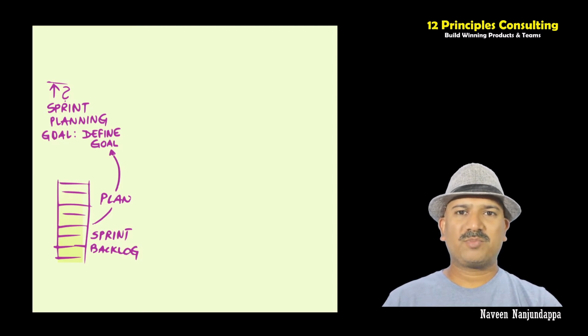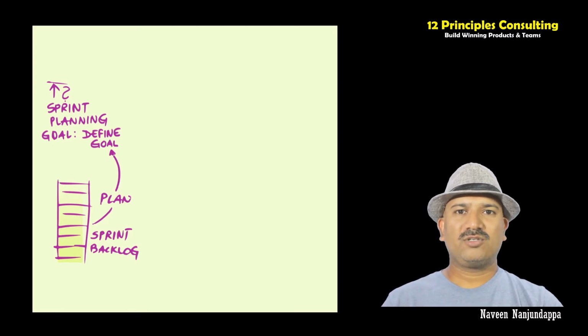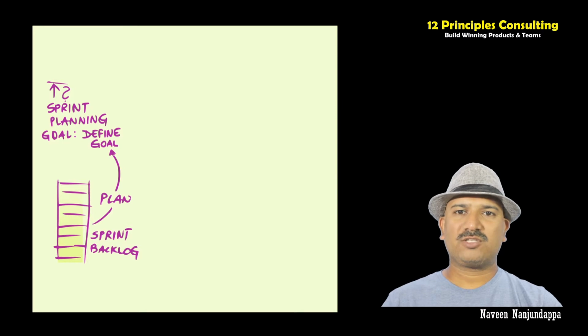By the end of the sprint planning meeting, the developers should be able to explain to the product owner, the Scrum Master, and all the stakeholders what their goal is and how they intend to reach the goal with their plan. This is a maximum of 8 hours for a 4-week sprint or a 1 month long sprint, and you could reduce it appropriately for a shorter duration.